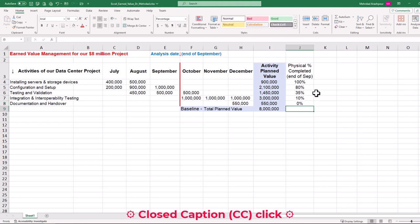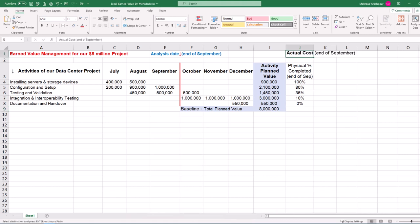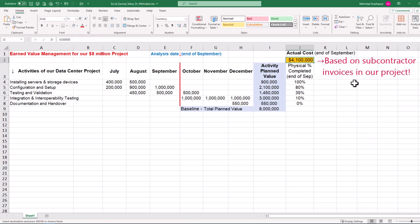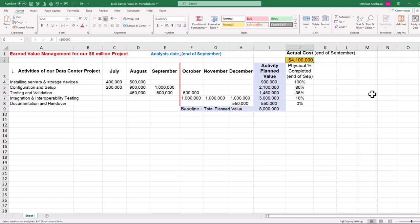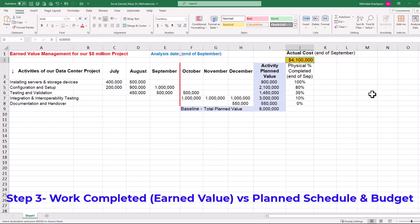In every project, we should review subcontractor invoices and payment requests to validate work completed and accurately find actual costs or AC. This figure at the end of September is $4,100,000. This concludes the second step in project earned value management using Excel.